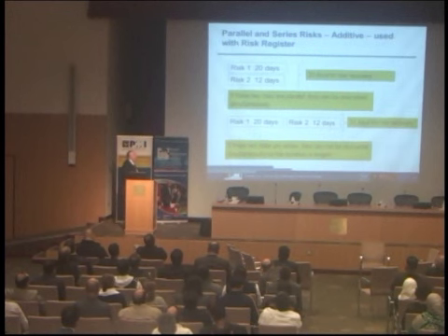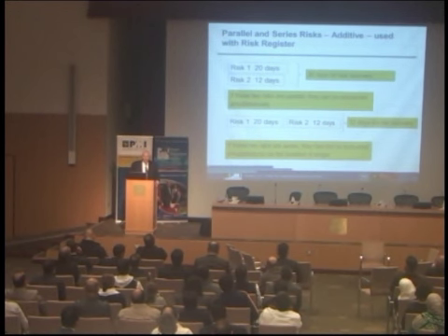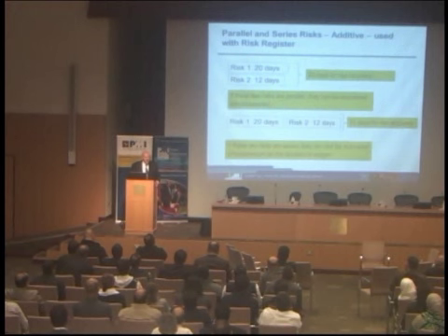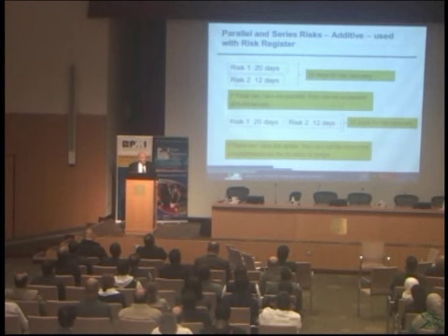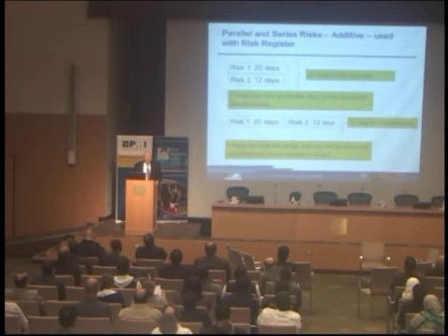Okay? Well, what happens when two risks are assigned to an activity? Well, the impact is really how long it takes to recover, and you may have the impact in parallel because maybe you can recover from both of those risks simultaneously. So there's a 70% probability of one risk and 50% probability of another risk. On 35% of the iterations, you're going to get two risks affecting that activity.